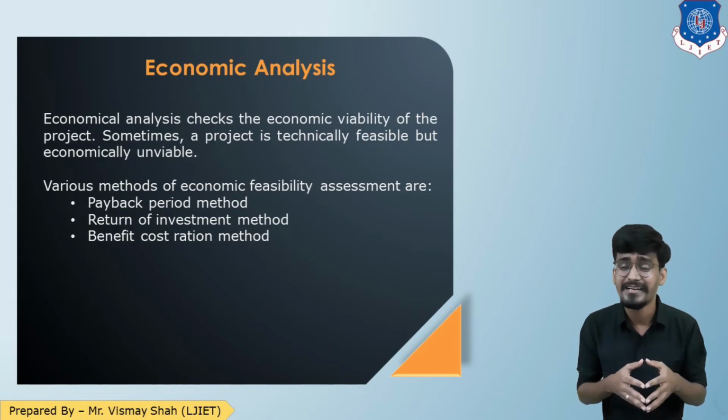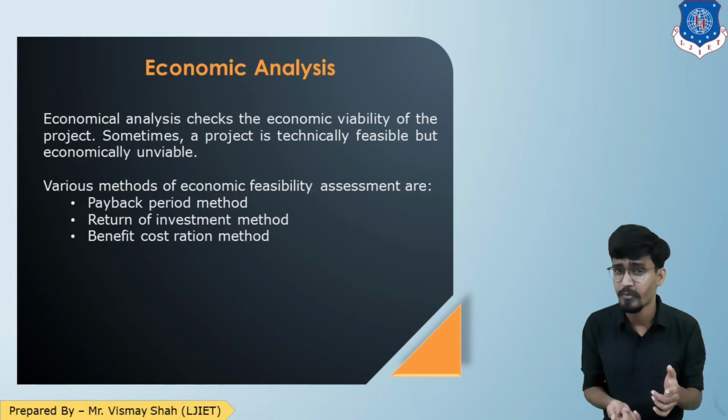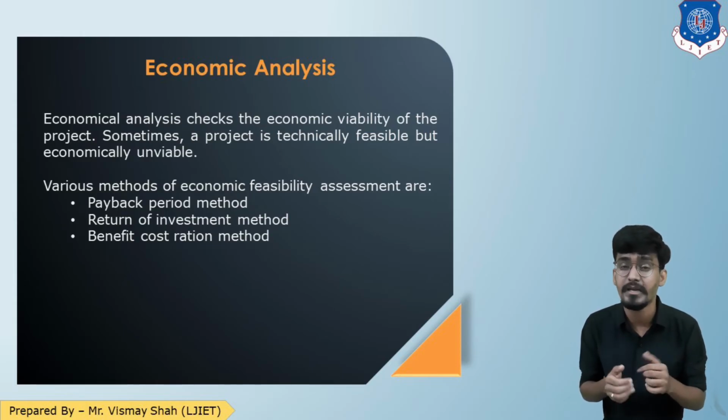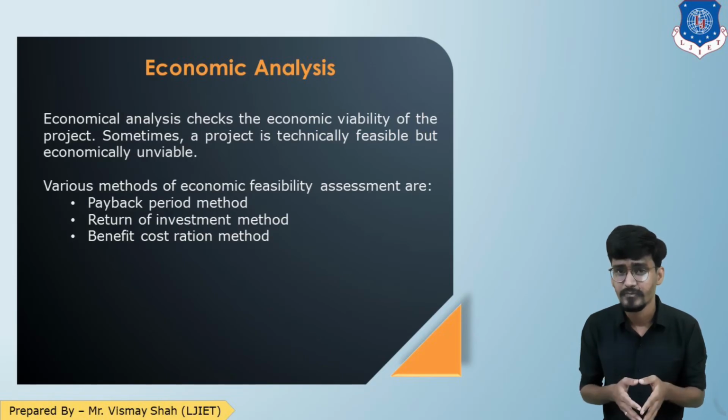In economical analysis, the project is evaluated by various methods such as the payback period method, return on investment method, and the benefit cost method. So these are the economical analyses which are done on the project. Sometimes it may happen that a project is technically possible but economically not possible. The client must not go for the project if it is economically not possible, because he is not going to get the returns out of that project. I hope we are clear up to this point.